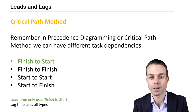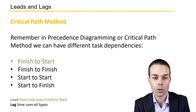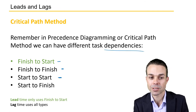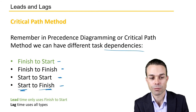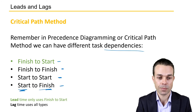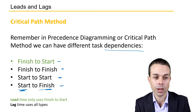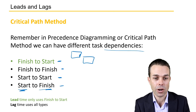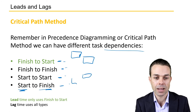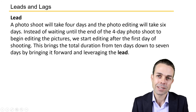In precedence diagramming method or the critical path method we can have different task dependencies: finish to start, finish to finish, start to start, or start to finish — where for example the second activity cannot finish until the first activity has started. Lead time only applies to finish to start, where the next activity cannot start until the previous activity has finished. Lag time however can affect all of these dependency types.